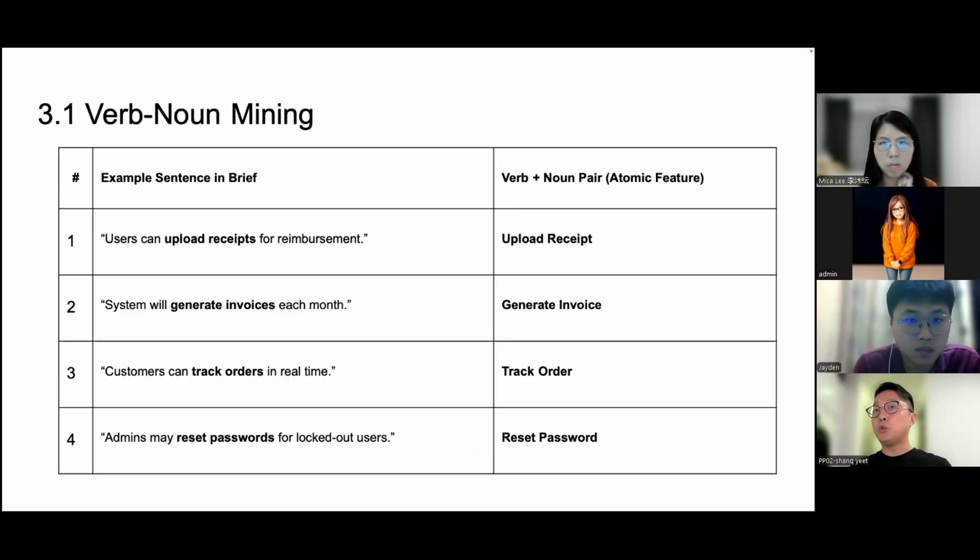Of course, at the same time, it's good to roughly allocate what this feature is related to in general, right? Because you don't know what domains you need to tackle, but you start to assign something you think is relevant. For example, the first one is about receipt, right? Then maybe you see another one that is to upload a banking statement or whatever, something like that. Maybe then you change this to something like upload financial document. The point is about grouping things that are very related together so that later we can plan the work to develop or deliver these kinds of features at the same time.